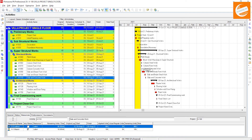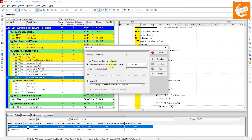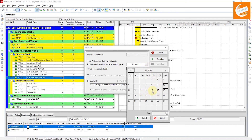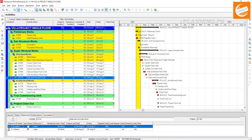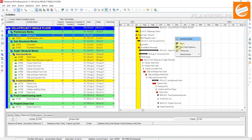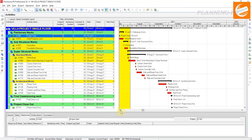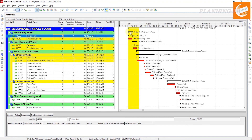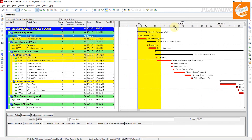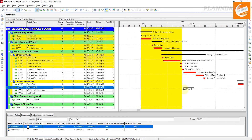If you want to see the activities, schedule your project. For example, if we schedule this project up to 15th of July, select it — you can see your spotlight will move. Schedule it, and your entire spotlight is moved. This spotlight function is most effective when you update your schedule to a new data date. For easy tracking, you can change your time scale format to three lines showing month and week, so the days are easy to track. Now you can see the year, month, and dates — you can move along the timeline as needed.